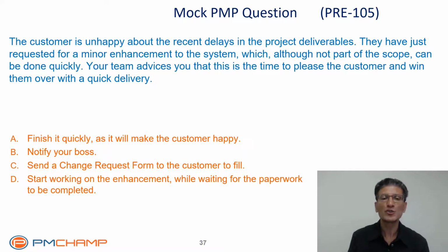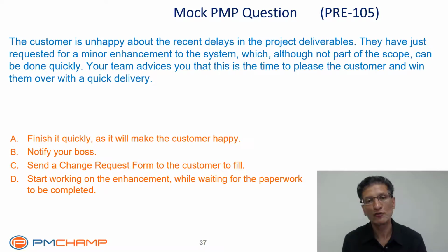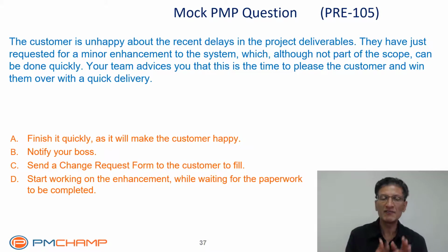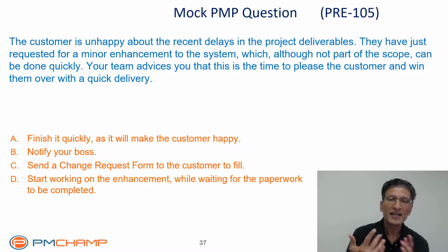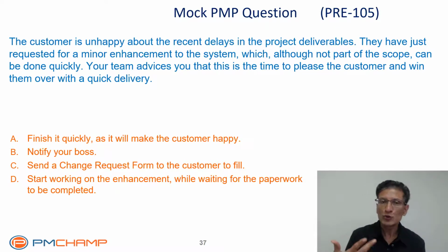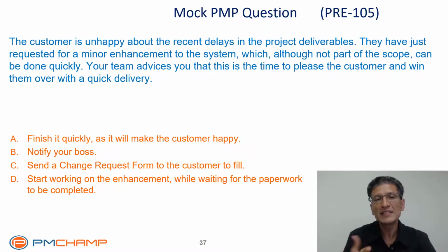This leaves only one choice. Send a change request form to the customer to fill. Once the customer fills the form, we will then start our change management process. We will evaluate, assess, and decide whether to do this change or not, how long it will take, who will pay for this change. Because if you simply do the change, who is paying for it? Whose time and money is being spent?